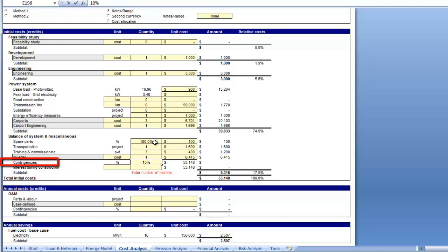When projects require large amounts of metals, the biggest financial risks or opportunities may relate to fluctuations in commodity prices as well as interest rates. While this is a preliminary study, costs for this type of project typically are not expected to vary more than 10%. So this is what will be used as a contingency value.